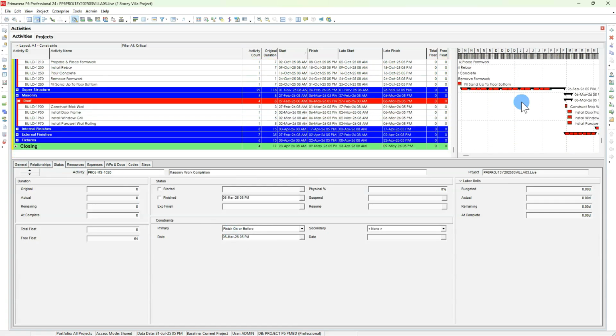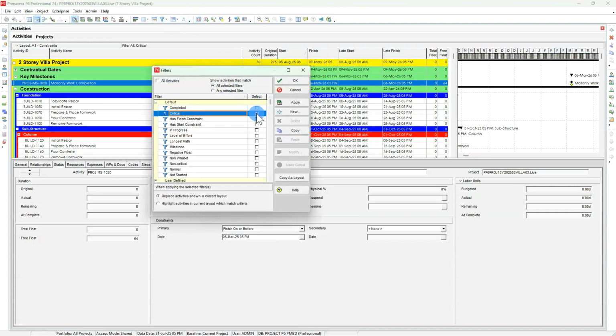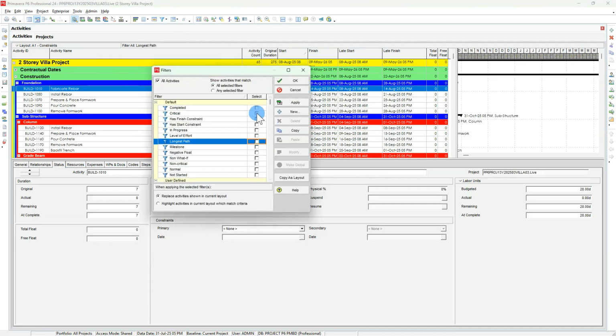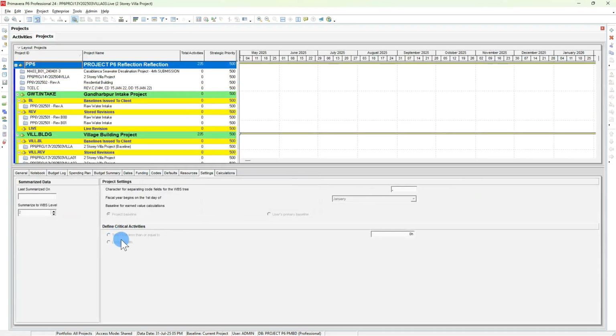And out of that 70 tasks, 4 or 5 are not actually on the critical path, but we have put them on the critical path by putting the constraint. So if I put the longest path here, these 5 tasks will not be here, it will be 65. So why was it not like this before? Because now I will show you. Let me open all, put the 8 hours here.